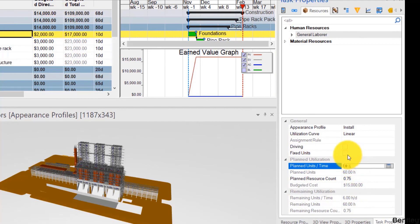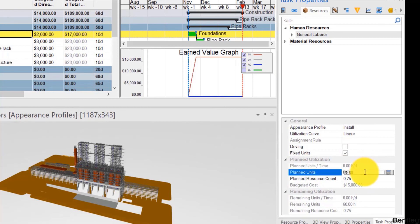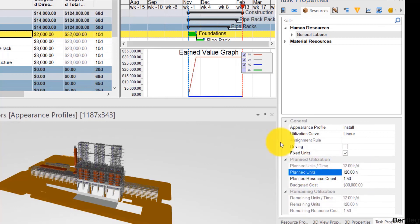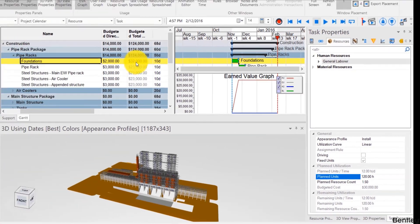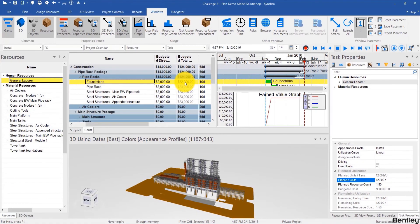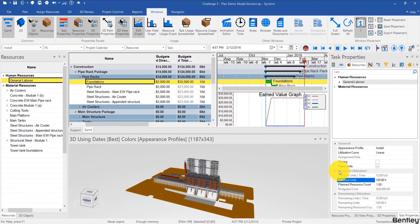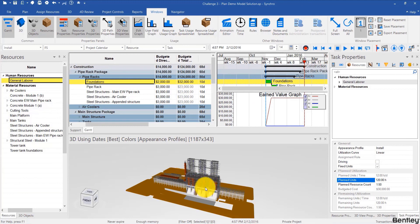You can also have a fixed number of units. And rather than 60 hours, let's say this is going to be 120 hours and we see the cost change. Now, later on, we're going to cover how to change that in bulk for multiple activities and how to even automate this using a script and leveraging the quantities that come with the model. But for now, this is a good start and I'll see you in the next video.